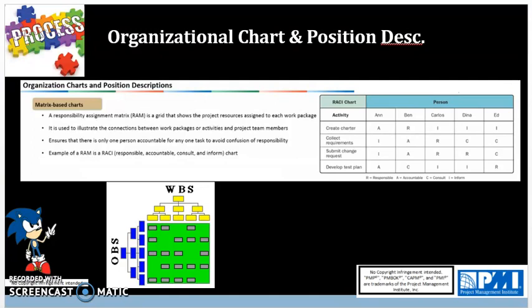So basically you can see here in the green, yellow, and blue the intersection between the organizational breakdown structure, basically taking the org charts, and the work breakdown structure that we did in scope, which creates a responsibility assignment matrix. The intersection of those is the responsibility assignment matrix, and this will help in assigning work more easily.